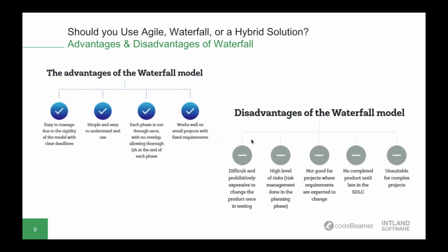Let's take a look at the advantages and disadvantages of Waterfall. Well, the advantages are obvious. It is relatively simple, logical, and its very structure is designed to avoid mistakes. So there are no overlapping phases in a waterfall development lifecycle, and therefore these projects are generally a little bit easier to oversee. If you have fixed requirements that cannot be reasonably expected to change over the course of development, using waterfall might be the right choice.